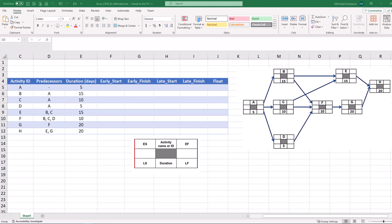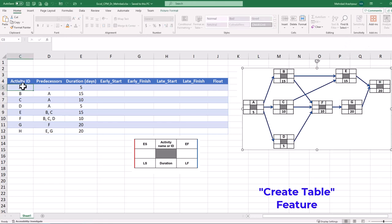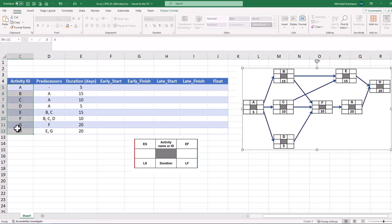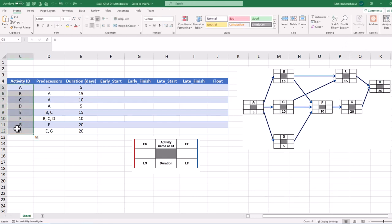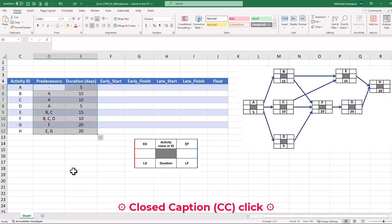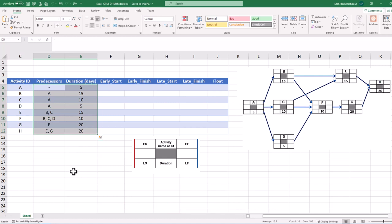Although Excel doesn't provide a direct solution for critical path analysis or CPA, we can activate the create table feature to streamline our calculations. You can follow along by getting the Excel workbook via the provided link in the description below. Let's start with a small project with 8 activities for which durations and dependencies or predecessors are specified. We can follow only 4 simple steps to calculate a project critical path.